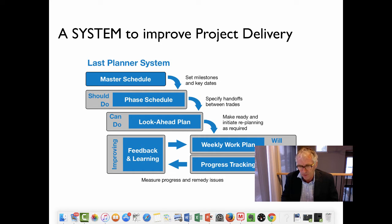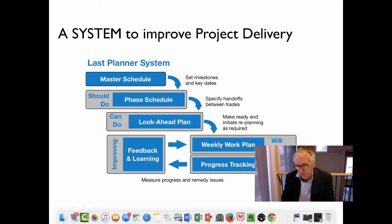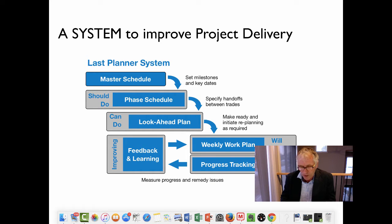In their analysis, they determined that to fix this problem, production planning needs to be from the bottom up, as the people doing the work have better capabilities for planning and delivering the work. They decided to design a system called the Last Planner System to improve the predictability and reliability of the construction process. It manages the relationships, conversations, and commitments that enable program and production planning decisions to be made collaboratively at the lowest possible level in the construction process.